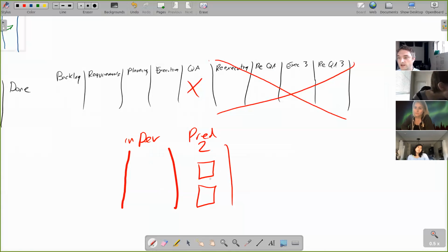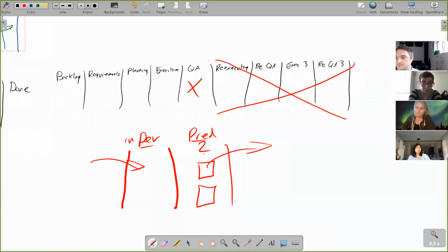We've already exploited the constraint. We've boiled this crazy phase process down, we made this as efficient as we can make it. So now it's time to subordinate the constraint. Instead of picking up the next story, your goal is to clear flow. Get this PR'd thing reviewed and out of here. That gets that out, which makes room for your next story. And part of subordinating it was also, these aren't 2 different teams. They're not different people. The dev team is working both of those columns.